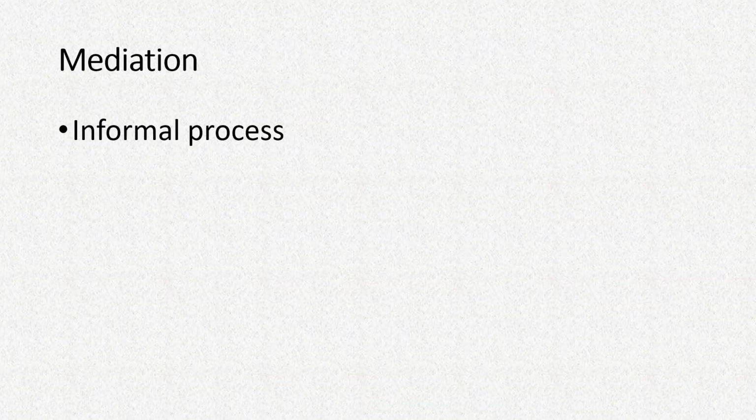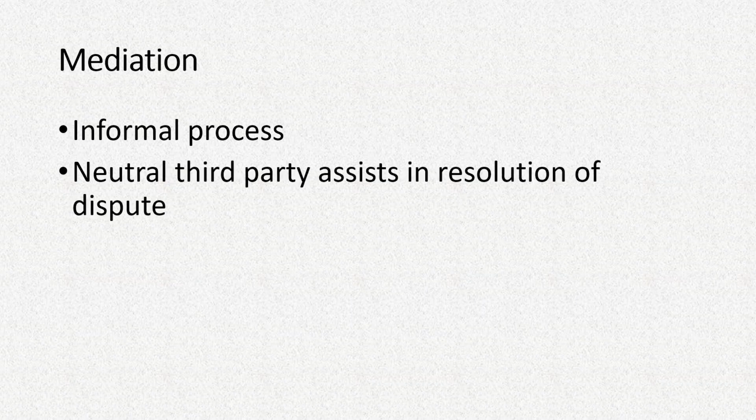So mediation is an informal process where a neutral third party or third parties assist in resolution of the dispute. So they will give you some suggestion that if this is the case, you are confused in interpreting this kind of a clause and so on, so you can do this, or this kind of a solution can be adopted.